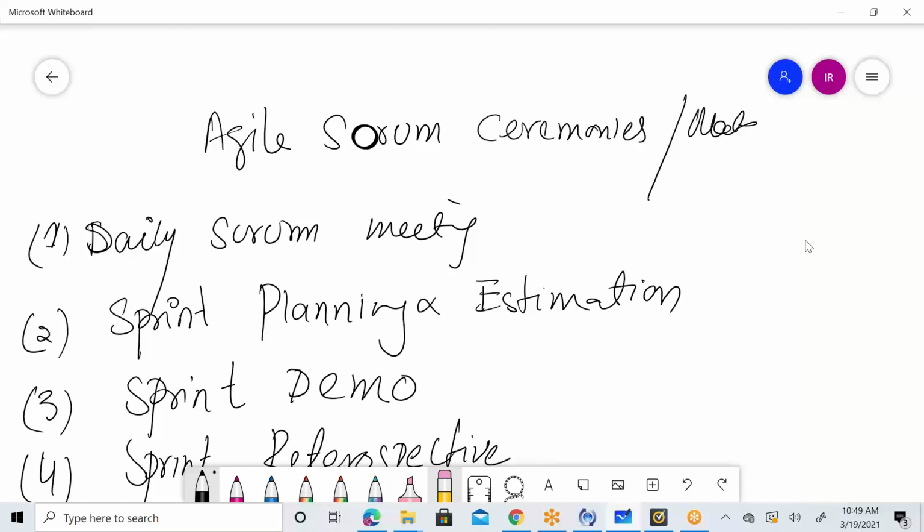But it can happen, and if it happens, it has to go through the change management team. The CMT team needs to give approvals on budget and resourcing. I have to do analysis, and the development team has to do analysis. Eventually the ticket will be created. That ticket will have everything in terms of budget and resource analysis, and then that ticket needs to go through all the major stakeholders, and they need to sign it off and approve it. Once approval is given to me, I can change everything, doesn't matter.